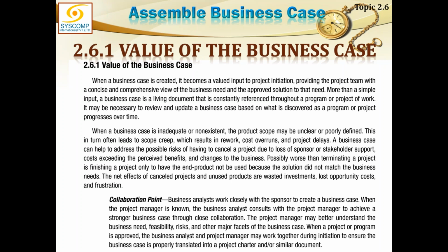Scope creep means the scope of the project is changing without due permission or proper change request procedure. So unknowingly you are constantly making changes to the scope without a formal process. That is called scope creep. And if you do that, naturally you have to work more, and naturally there is no money for that work, so you will run out of the cost and the project will also be delayed.